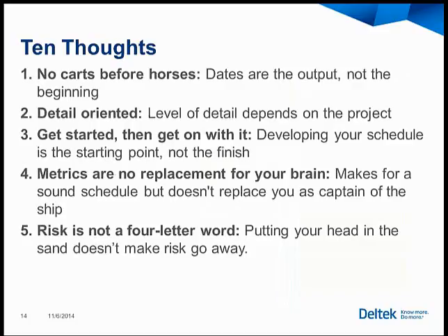Detail-oriented, I can't tell you the right answer here. It's not as easy as number 1 where I say, yeah, use logic. Number 2, the level of detail depends on the project. I don't like 100-day, 200-day activities. I don't know, on a 20-year project, those might be reasonable durations. On a 6-month project, I don't want to see 100-day durations. So detail-oriented as it applies to the work at hand on your project.